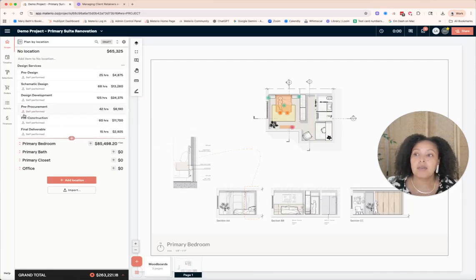One of the first things that I'm going to do then is make sure that my procurement specialist is aware, and whoever is handling my billing for the project is also aware that we're ready to go on certain things. Now, you may have a separate contract. Like I certainly move into a separate contract for procurement. I keep that as a separate contract from the design agreement. And that's because there's so much that's still unknown when I'm working through design, and working through the design process will inform what I want to have exist in my procurement agreement. But we're just going to move forward with the idea that we know that we have an agreement with our client and we're going to move forward.